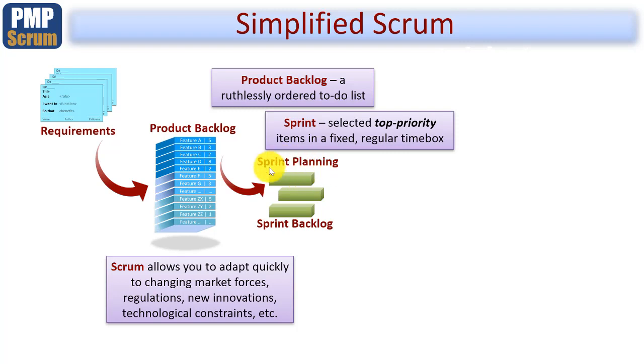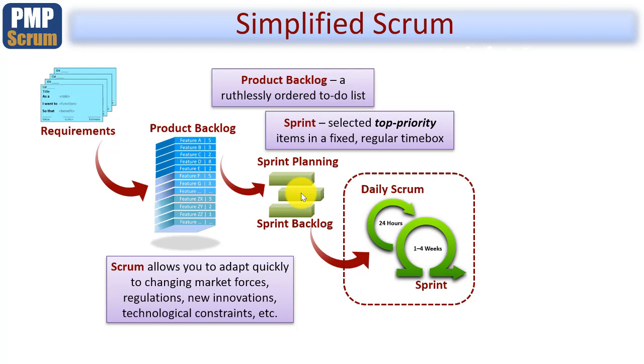So as part of sprint planning, you identify the activities, and then you might find yourself going back and swapping out some features as a result of the activities needed to carry out within the sprint. Ultimately, remember that a sprint is a time box, typically between 1 week and 1 calendar month in duration, and you have to choose the number of features that can be done within that sprint. What happens now, of course, once that's approved, is that you can start the sprint itself.